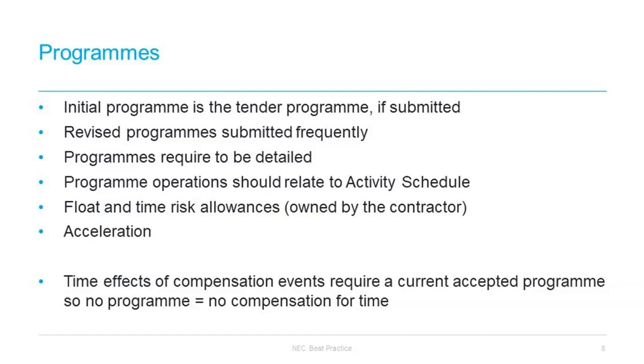You work out the time effect of a compensation event, and then separately you can be asked to provide a quotation for acceleration. In either of those circumstances, for whatever reason, if an employer wants to bring a completion date or a key date forward, whether that has been pushed out by compensation events or not, they can ask for an acceleration quotation, and that is where the contractor tells the employer what the impact is of that acceleration in terms of both time and cost.